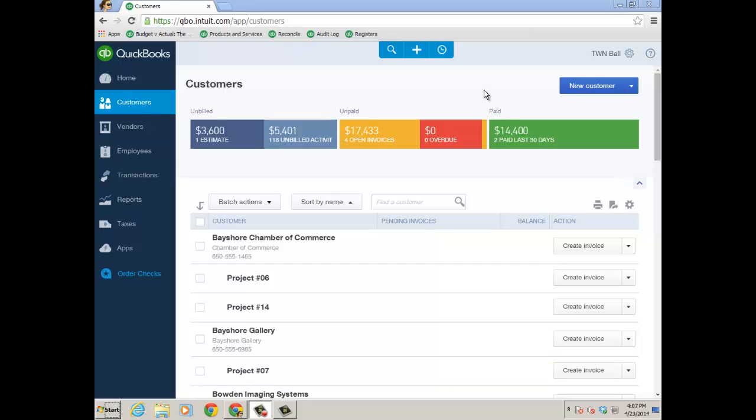It's focused on a certain type of job costing with QuickBooks that you used to do with Pro, Premier, and Enterprise, and that's estimate to actual. Where you create the estimate, you have all your items on there, and then you want to be able to report on what you've budgeted for the job, and then what are the actuals for expense and revenue.